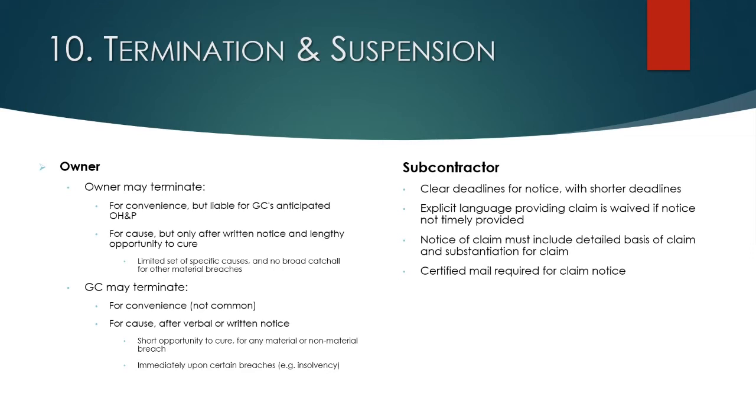And when you think through your termination provisions, not only is the type of notice, the time of cure, and the types of defaults something you should consider, but also consider what your remedy is. What if you're terminating, what do you get? If the owner's terminating you, what do you get? Overhead and profit, costs due to termination. There could be costs that arise solely because of the termination that aren't in your contract price.